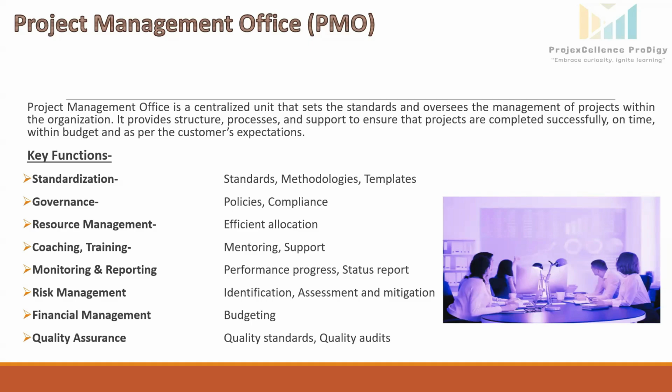It tracks the project cost against the defined budget and manages the financial reporting. Quality assurance. PMO ensures that project deliverables meet the defined quality standards. It establishes the quality control checklist and conducts regular quality audits.